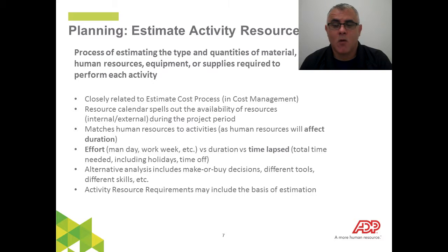Let's say you're going to clear out the land because you're going to build a house there. So in that step, you need to make sure you've got your backhoe there, you've got your heavy machinery to do whatever that activity is going to require. So in estimating activity resources, you need to understand how many people, what types of materials are going to be needed, and how that is going to affect your durations and work efforts.